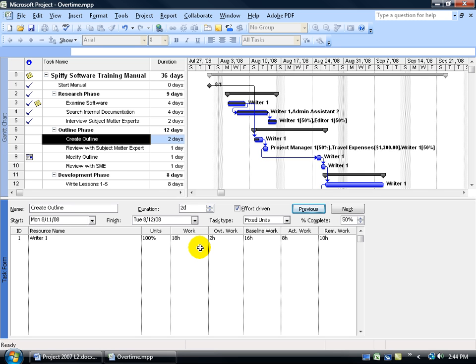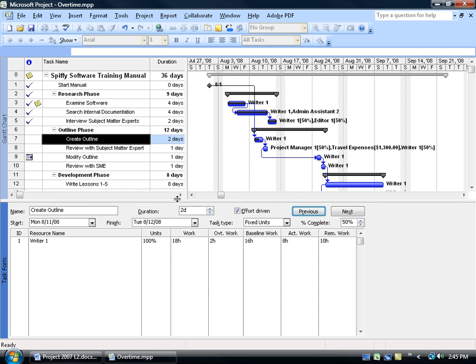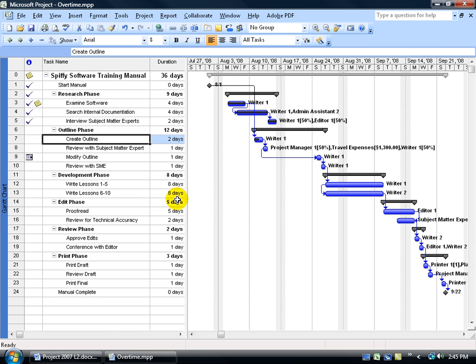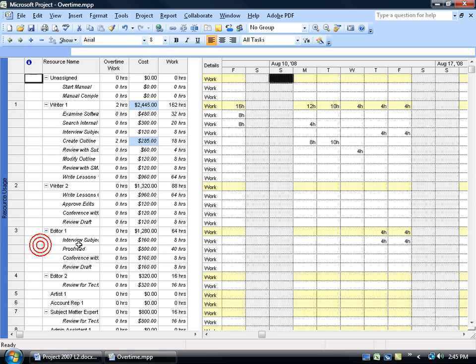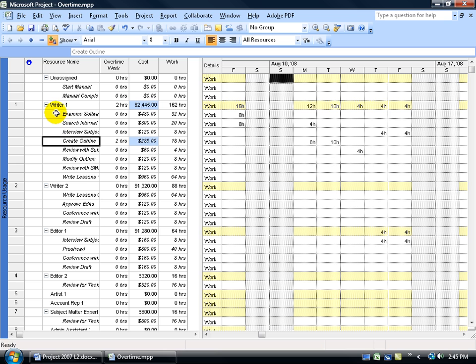Is it the Tuesday or Monday? We can go back to the task usage view and find out which day has the overtime. But again, as far as project is concerned with the schedule and budget calculations, it doesn't matter when the overtime hours are worked, only that they are worked. To get rid of the split, I can double click really fast on that split line, and then right click on the collapse view bar, go back to the resource usage view. There it is, create the outline by Rider 1. You can see over here in the grid that 8 hours on the first day and the 2 overtime hours on the second day.